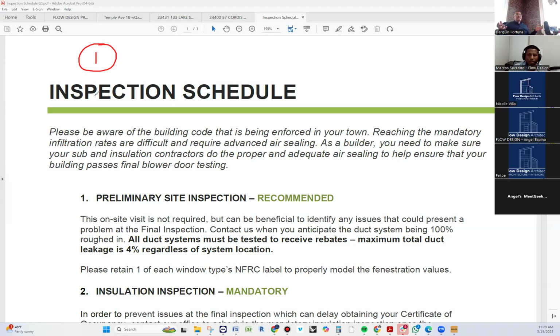It is basically what we do on drawings, but drawings are a design intent, and they don't necessarily meet the code. The building is the one that will eventually meet the code. We show a design intent of how we believe the code will be met. So they're going to create a projected Hertz, and the projected Hertz is a package that will project what the energy index or consumption of this particular building is, how efficient this building is.